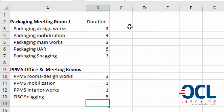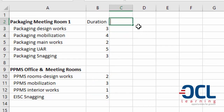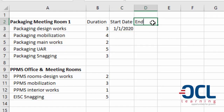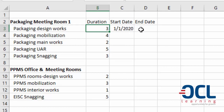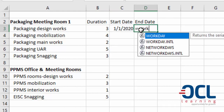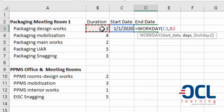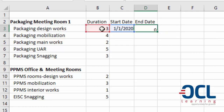Then five days. The start date shall be 1st January 2020, and the end date will be a date after the duration but must be on a weekday. We will use the WORKDAY function, which gives us the next working day after a start date excluding holidays.